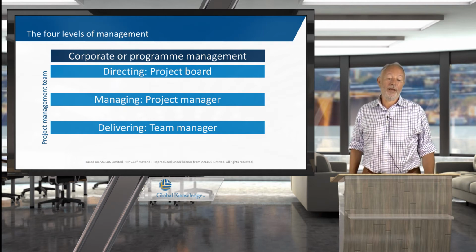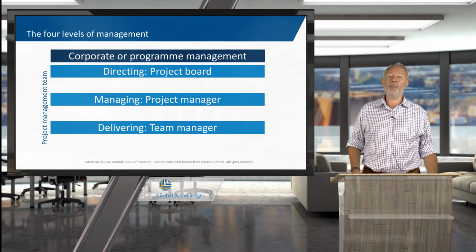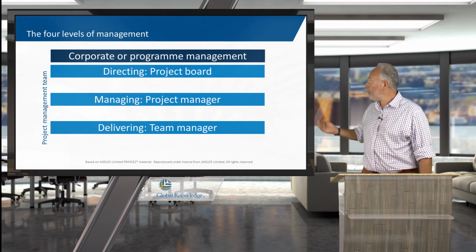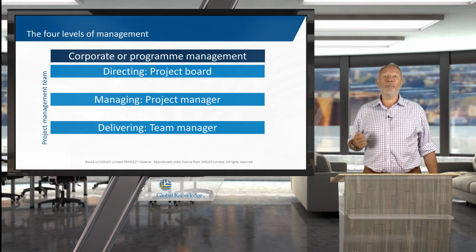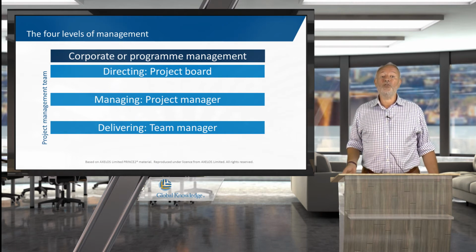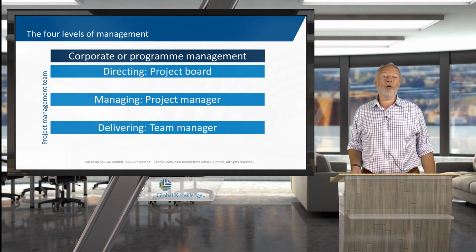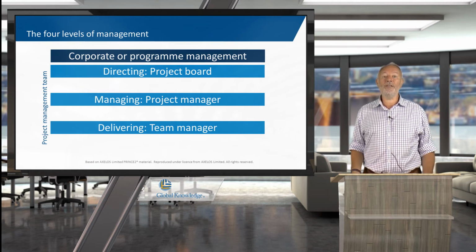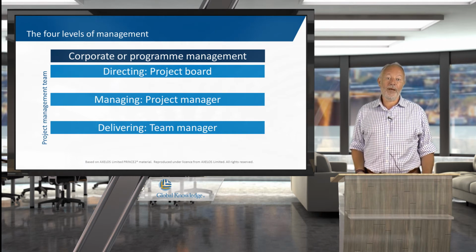Working for the executive predominantly, but for the project board in general, is the project manager. And the project manager is going to be running the project day to day on behalf of the project board. They're generally going to give the project manager the authority to run the project one stage at a time, as we will see in plans.